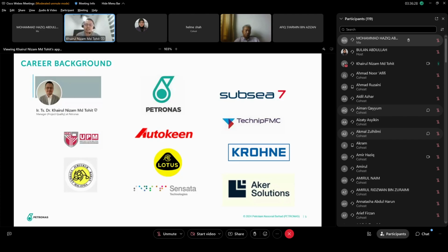So the skills that I gained from my career in the automotive industry, Acker saw this as a strength in my career. During that period, Acker would like to introduce their project management tool called the Project Execution Module. They wanted a milestone review for every stage of the project development, just to ensure that before we move to the next stage, everything has been closed. There's no carry-over punch list to the next stage that will jeopardize the final quality of the product or the services that we provide to the next part. So Acker saw this as one of my strengths. That's why they appointed me as a project quality manager.